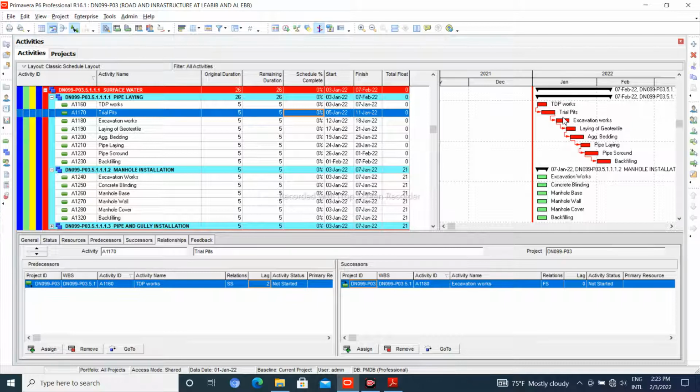In the baseline program, you are allowed only one activity open at predecessor and one activity open at successor. It's like a network, and later I'm going to explain what the critical path is and where the critical path is in the program.